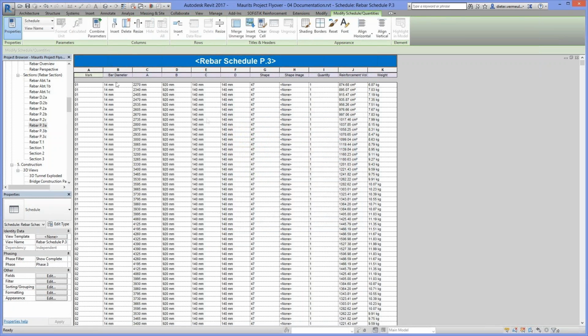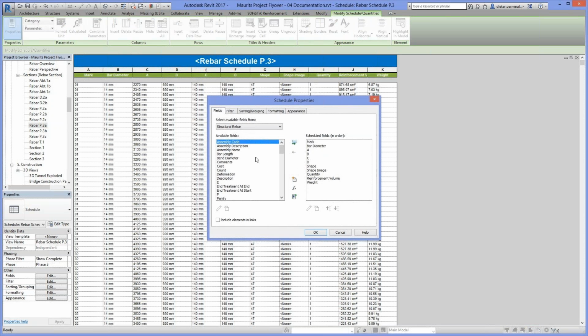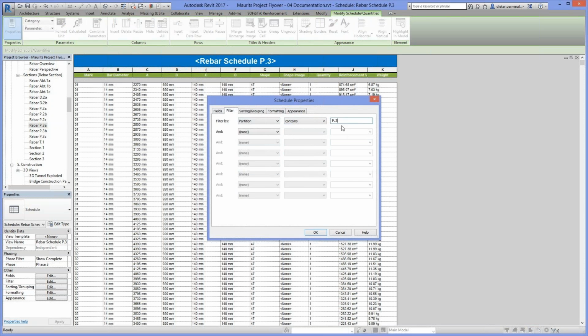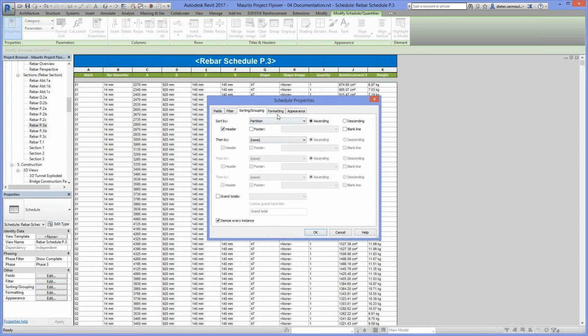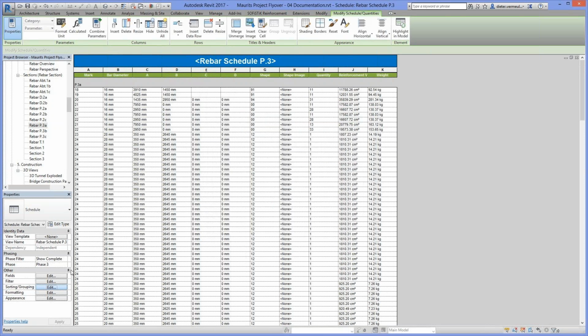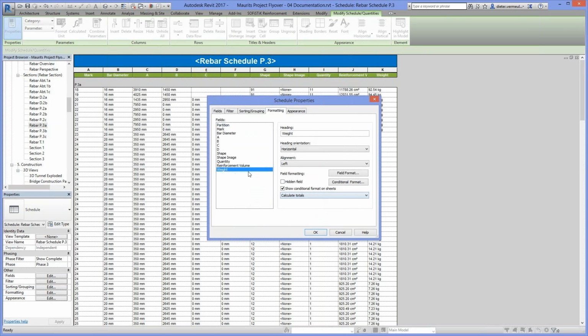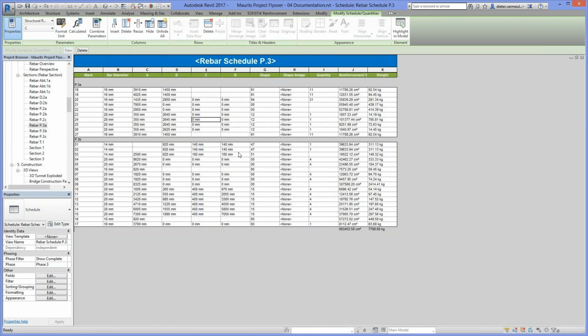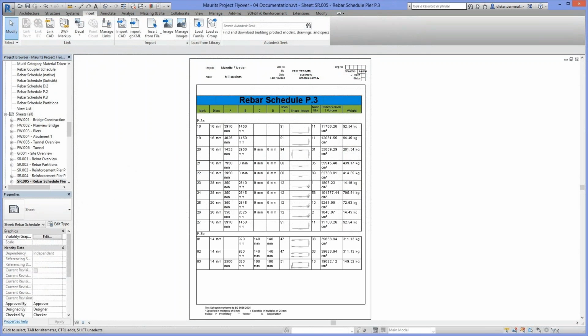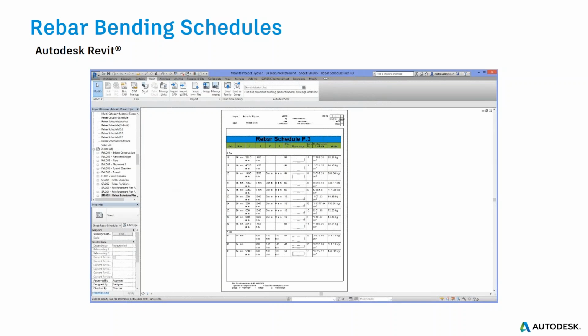As soon as you change something in your 3D model, this bill of material is automatically changed based on these changes. So again, a huge benefit is eliminating errors and mistakes. And I believe you will agree with me that if you are doing some project, there are many changes as you go, and what you need is a really dynamic tool which will automatically update, based on different model changes, drawings, bills of materials, and all deliverables which you need to deliver to other parties.